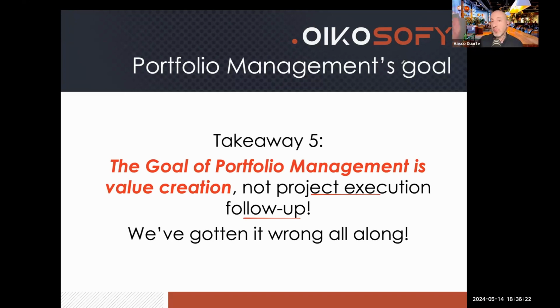So in the case of taxation software, which is a very easy case to understand, the law changes, your software needs to change, period. When you have that kind of project, the question is not, what should we do? The question is, what is the minimum we can do so that we are ready many months ahead of the deadline, so that we can use the rest of the time to find and use the legislation to our benefit,